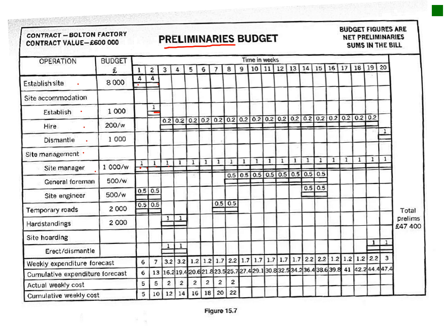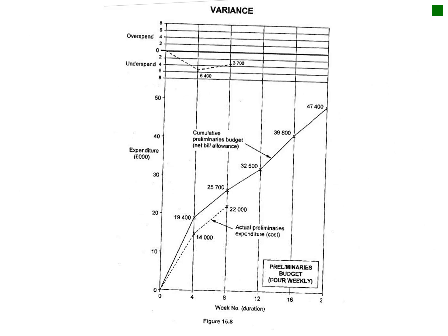It depends on how you schedule your project. Again, you add it to the bottom like such, and you have your cumulative action. You've got your actual weekly cost here at the bottom, and then you've got your cumulative weekly cost here at the bottom. Then you can just easily plot that. Again, this is your planned, here's your actual, and there's your variance. Okay.